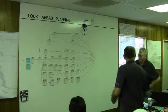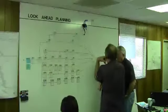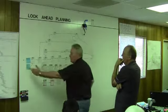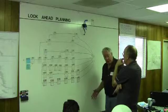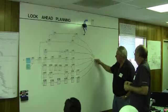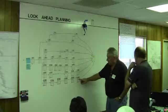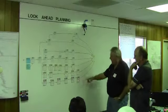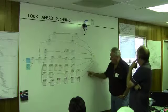It appears to me, if I can make a suggestion — you talked about working backwards. This is called a pull plan. We work backwards, but we don't work backwards initially, because most of us are used to working from start to finish. We don't want to confuse you with the backwards pull planning language. However, when we get to this point, we want you to come up and look at one task — for instance, this is for you, Danny. Is this the only thing, with respect to what all these others do, that when complete allows you to declare that you've met the conditions of satisfaction? Or is there something else that needs to happen?